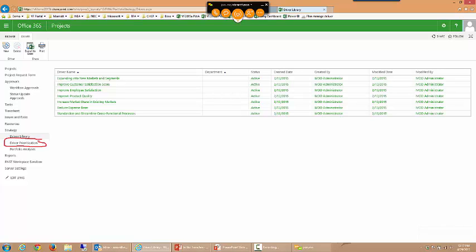If you get too many drivers in a single analysis, what's going to happen is it's going to kind of flatten out the distinction of projects and how they score against those drivers. So if we're scoring against 50 drivers, there might be like a 0.01% difference between one project and the next as it pertains to those. If we're scoring against 5 or 6 or 8 drivers, it's going to be a more distinct alignment of project priority, which you'll see in the analysis itself.